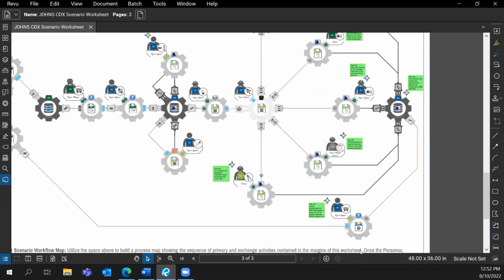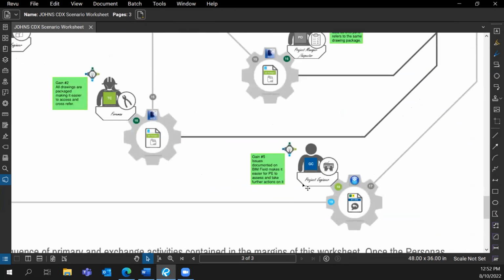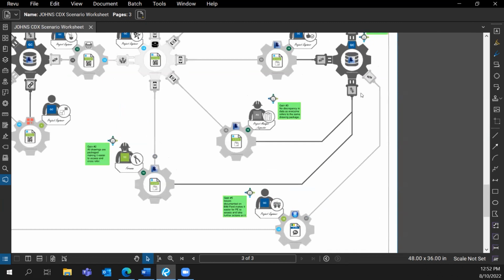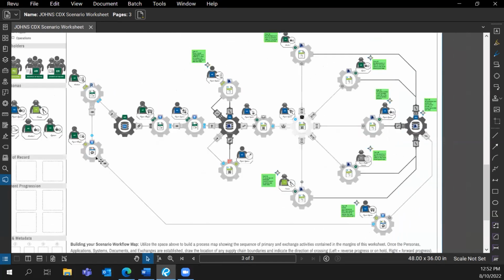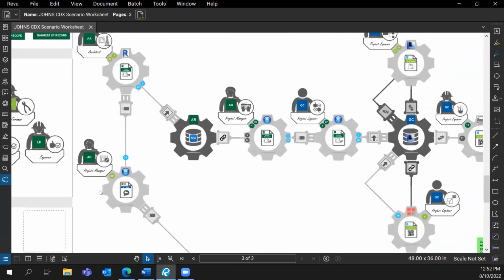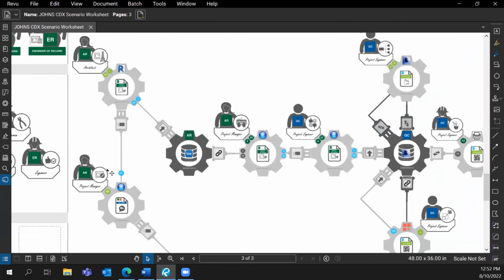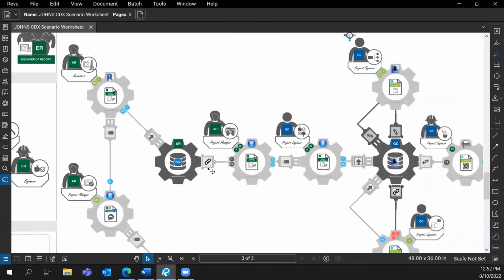And after that, the project engineer who's in the GC's office can access BIM 360 Field and go through all the queries, and then they can send in the RFIs, and then the RFIs go to the project manager of the architect, and then the same cycle starts wherein the updation happens.